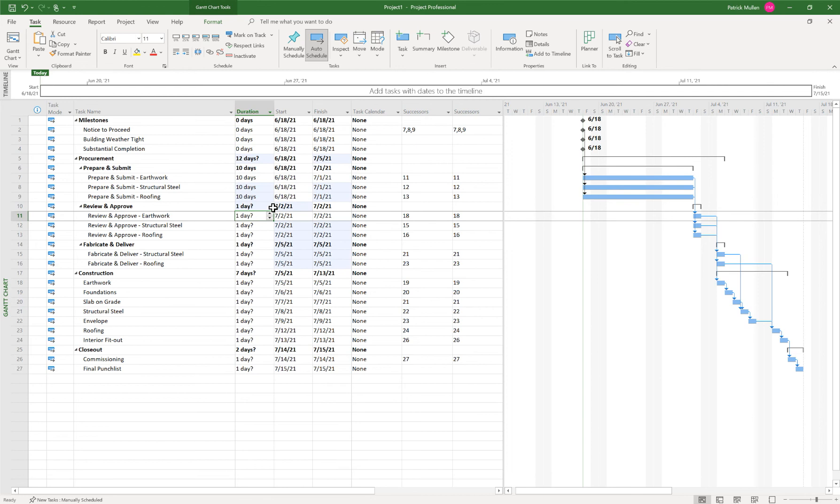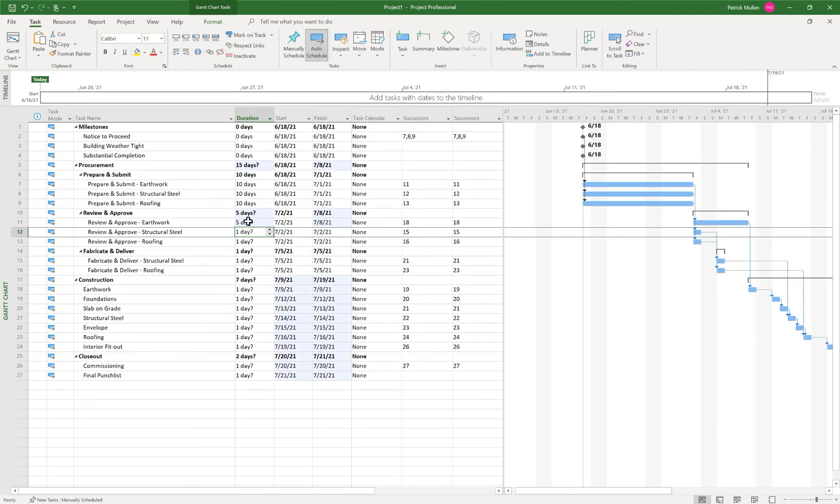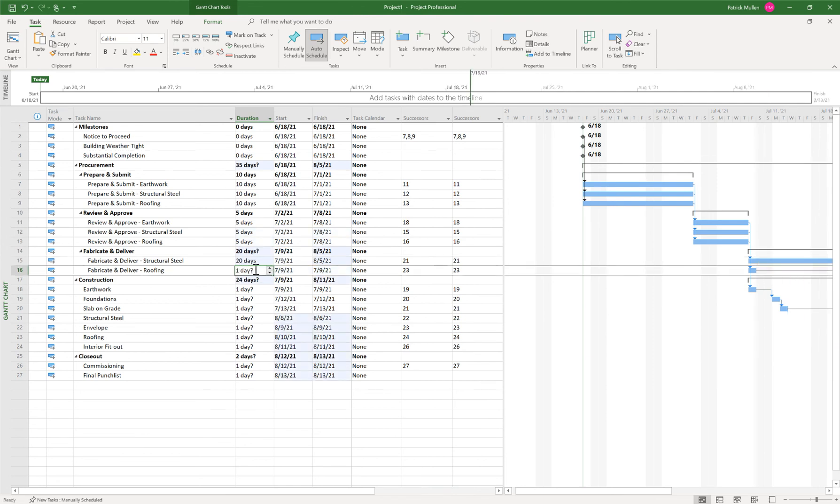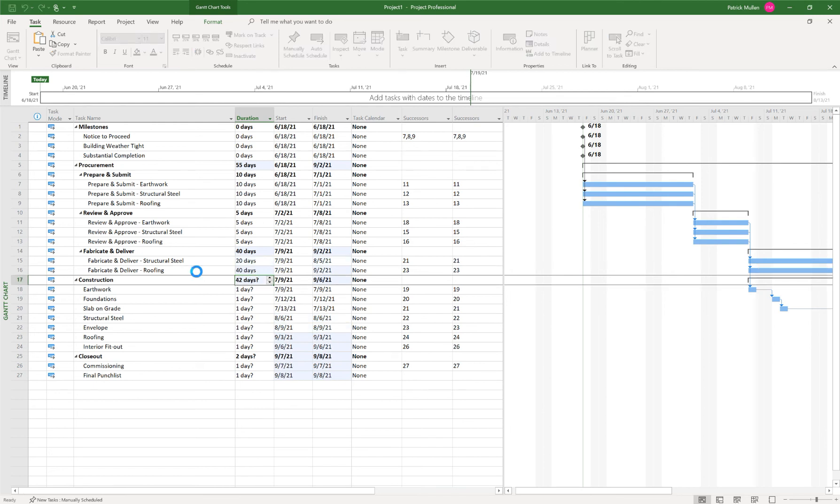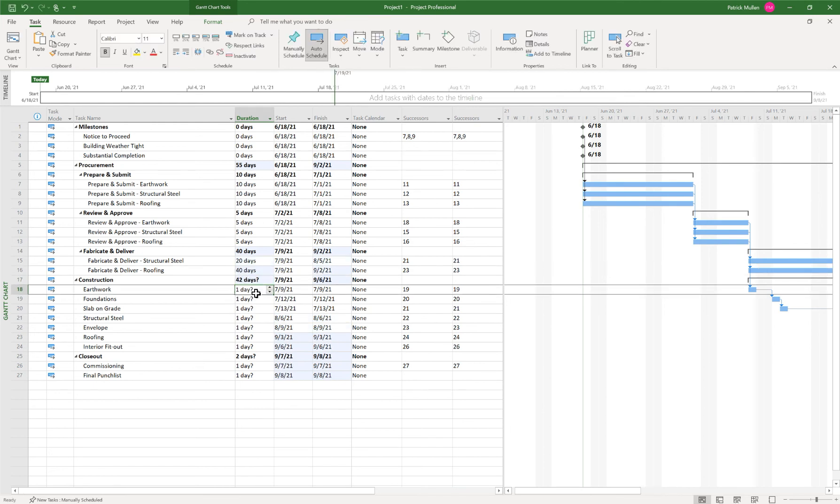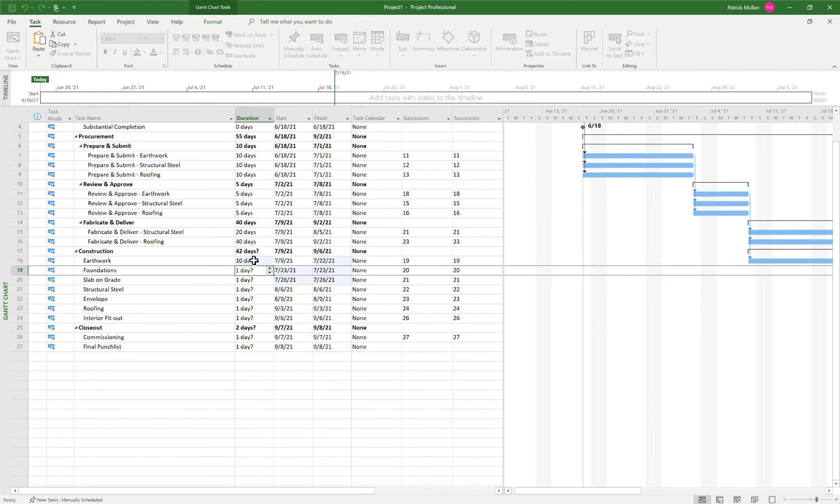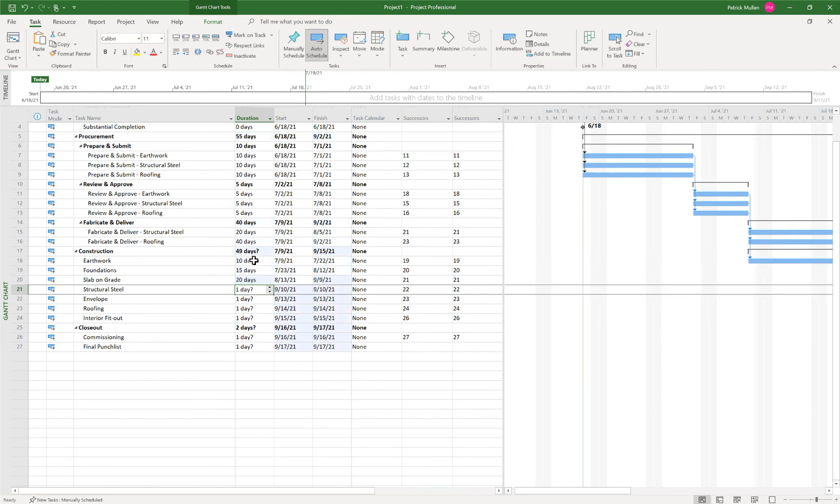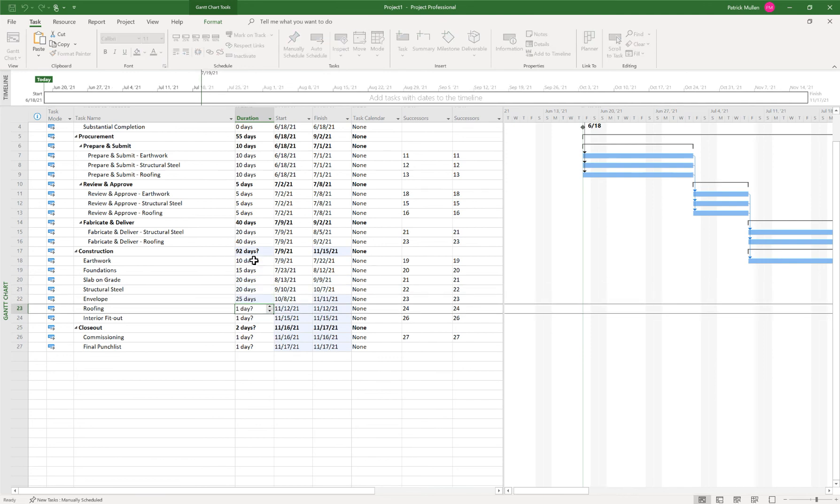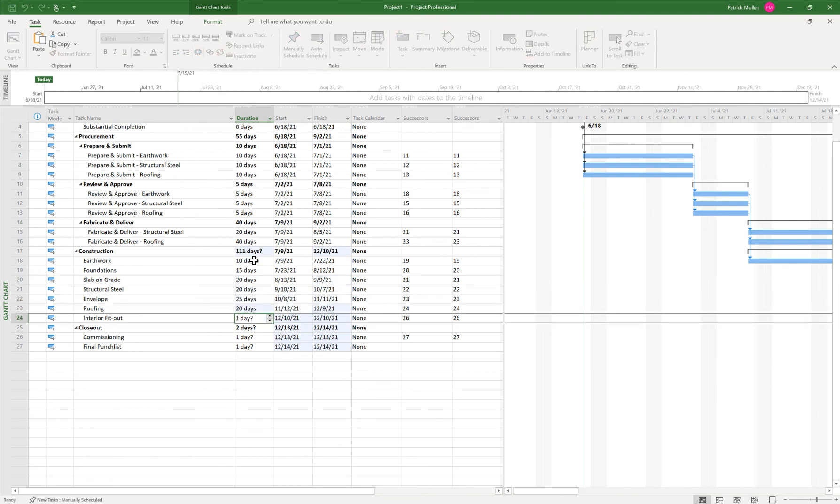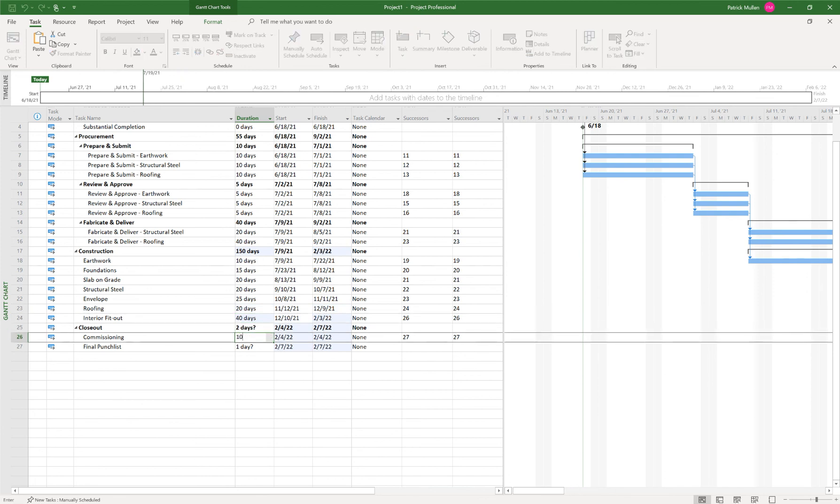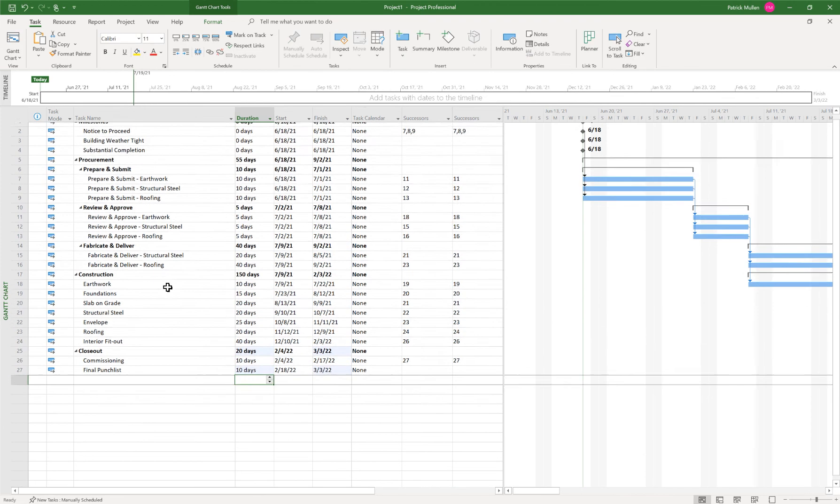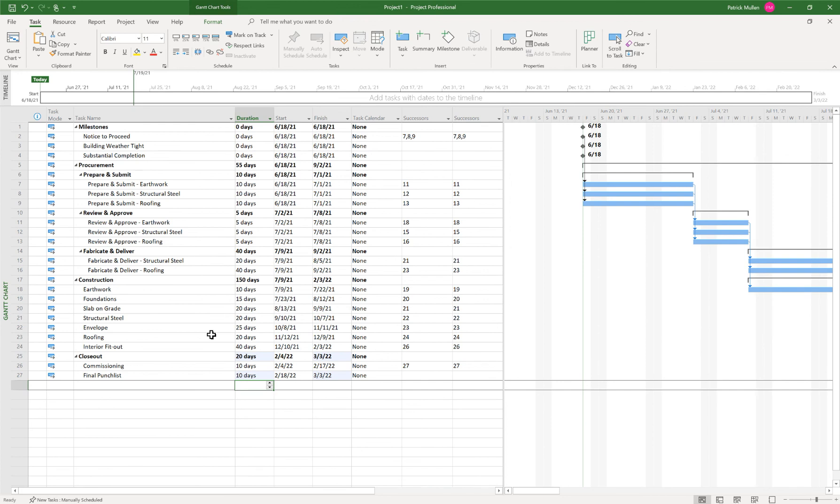Maybe our review and approve is one week. Let's fill down there. Maybe structural steel, say that's four weeks and roofing. Maybe that's going to be two months, 30 days or something like that. And then we have our earthwork, let's say 10 days, I don't know, 15. I'll just put some arbitrary dates. Don't judge if the dates don't look right. But let's say 40 days for that, 10 days, 10 days for final punch.